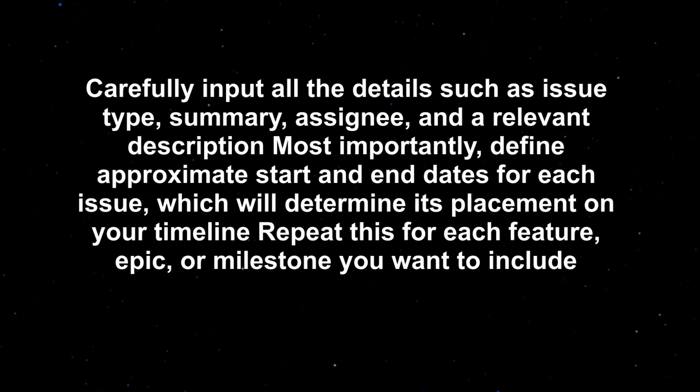Carefully input all the details such as issue type, summary, assignee, and a relevant description. Most importantly, define approximate start and end dates for each issue, which will determine its placement on your timeline. Repeat this for each feature, epic, or milestone you want to include.